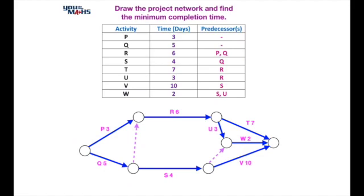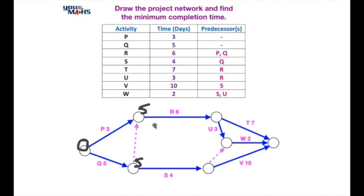Now let's look at a neater version of the project network to work out the critical path and best completion time. Starting from zero days on the left, moving left to right: Q feeds into the bottom node, so the best time there is five days. The top node has two arrows in — P at three days and the dummy activity from Q at five days. The dummy adds no time, so best time is the larger: five days.